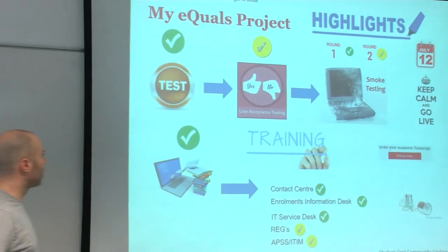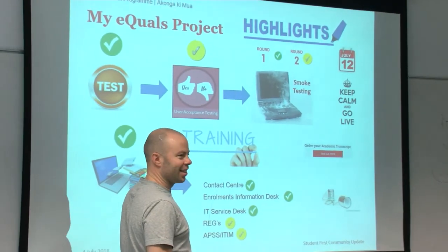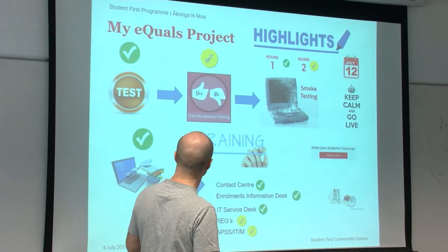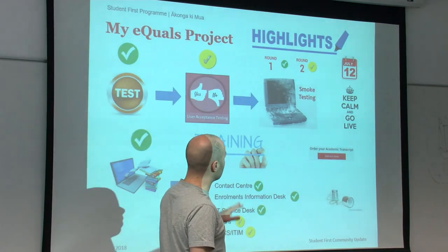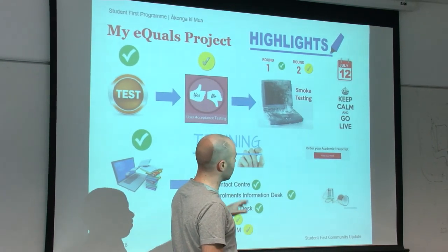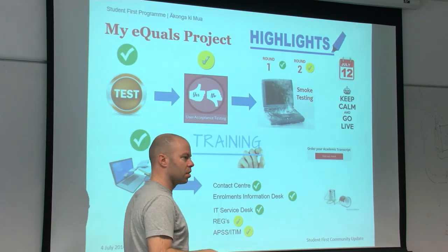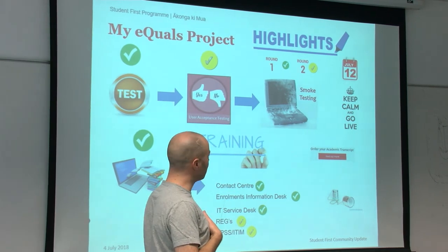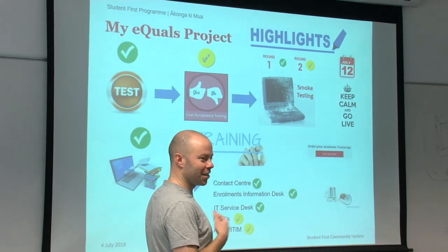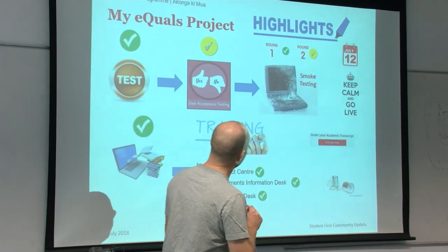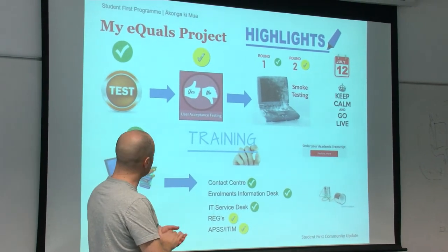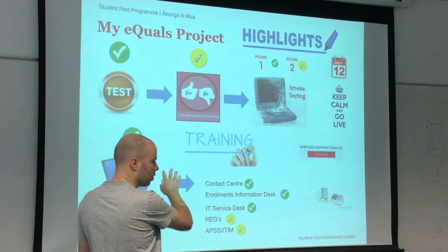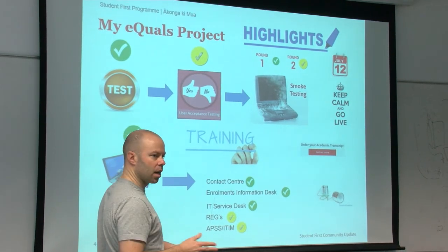All right. For those who attended last time, similar slide, a few changes. So where we are now is we've done essentially the first round of what we call our smoke testing, so we've actually productionised a lot of the components already. And we've pretty much finalised all the testing now. We're just running through what we call regression testing. So I've called it UAT, but it's really just regression testing